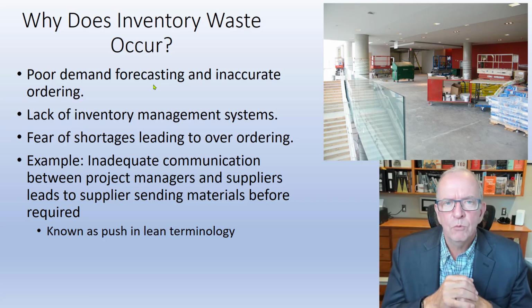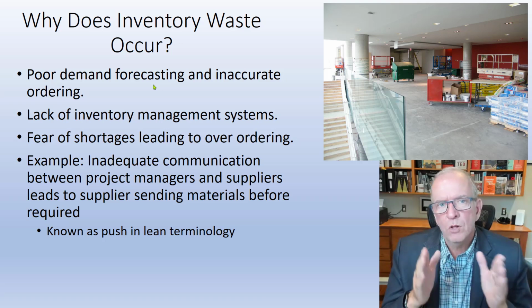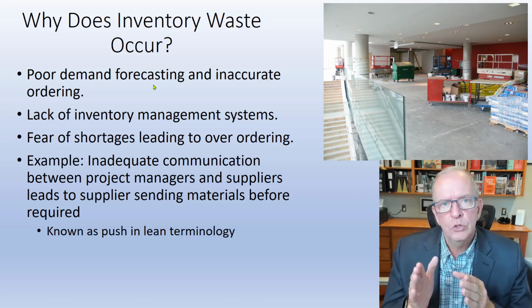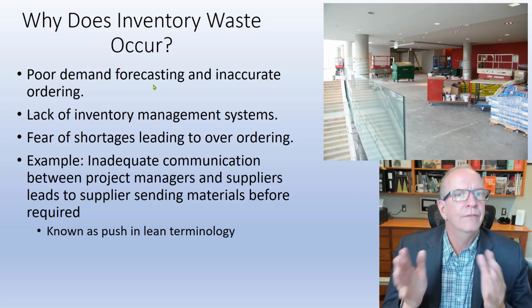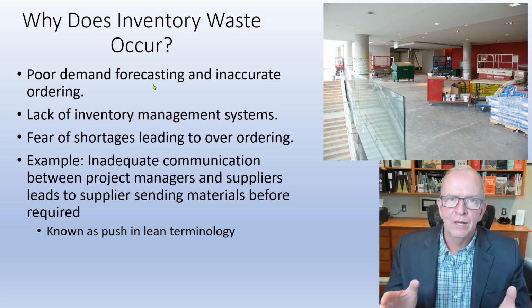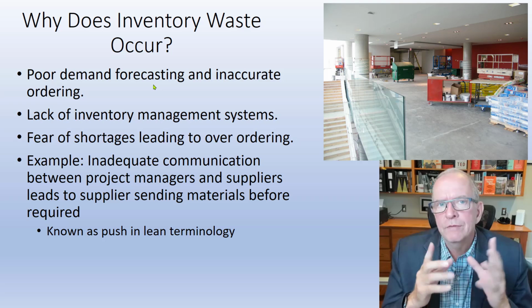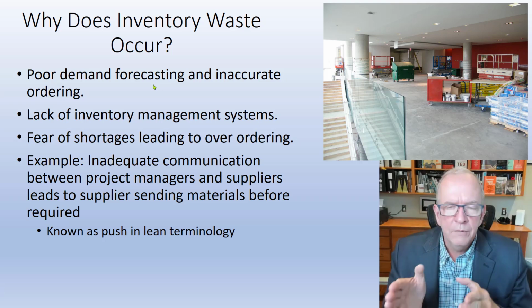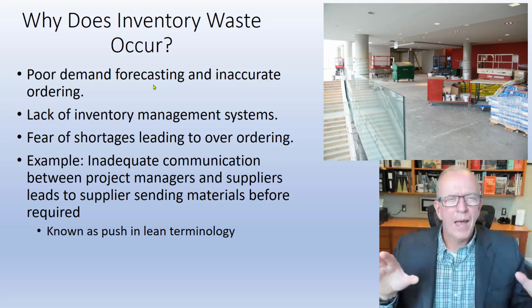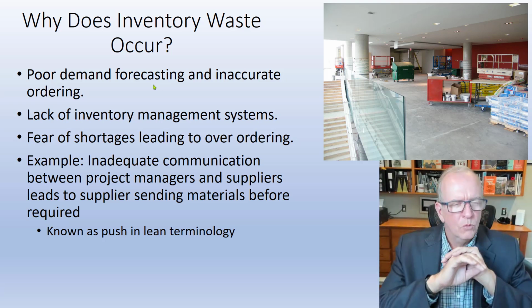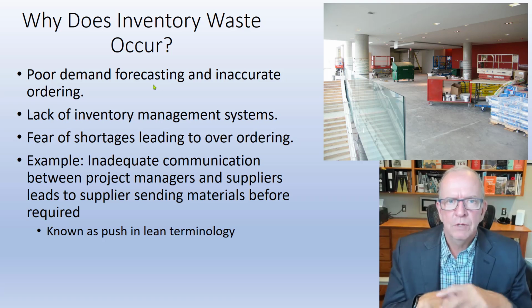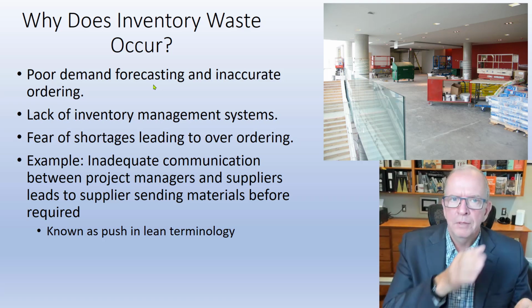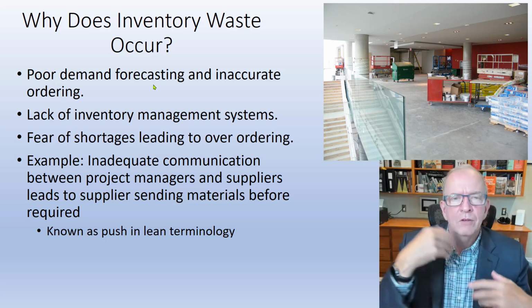Other cases, you've got to look at, well, could we order this in smaller batches? And then as we get closer to where we are coming towards the end, have more accuracy on what's left that we need to order. That way we don't have a lot of extra. It generally means that you may have some extra costs in your deliveries, but small batches in lean construction will immensely improve your schedules. Like, I mean, immensely improve your schedules. This is one of the principles of lean construction, is to have a continuous flow, but to also have small batches that allows for quick learning.